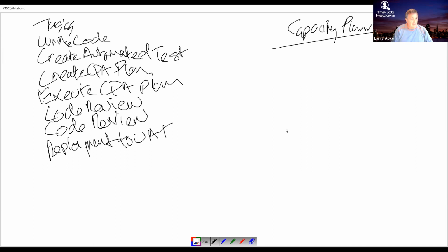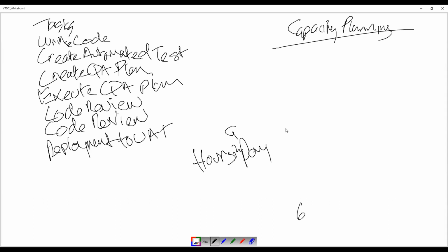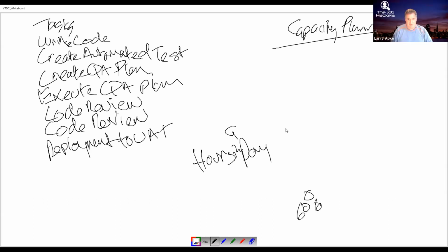So I'm going to ask them a few things. One, how many hours in a day? We talked about this, I think, before. How many productive hours in a day? Anybody know? You know what science tells us? Science tells me that 60% of your day is going to be productive. There are 8 hours in a day. That's 4.8 hours on the average. You're getting about 4.8 hours in an 8-hour day of actual productivity.